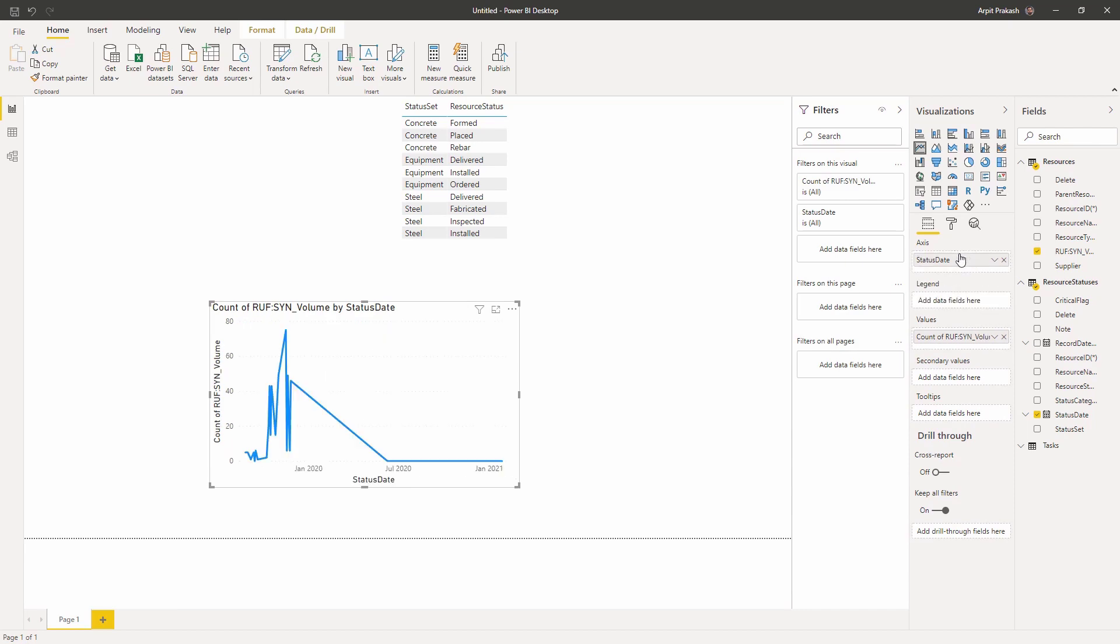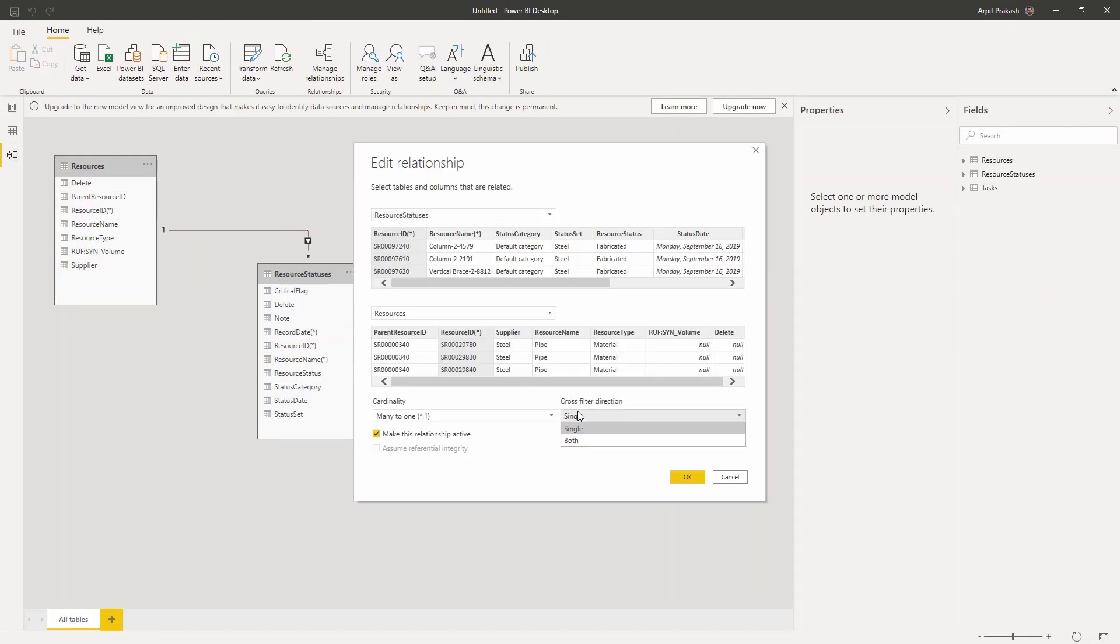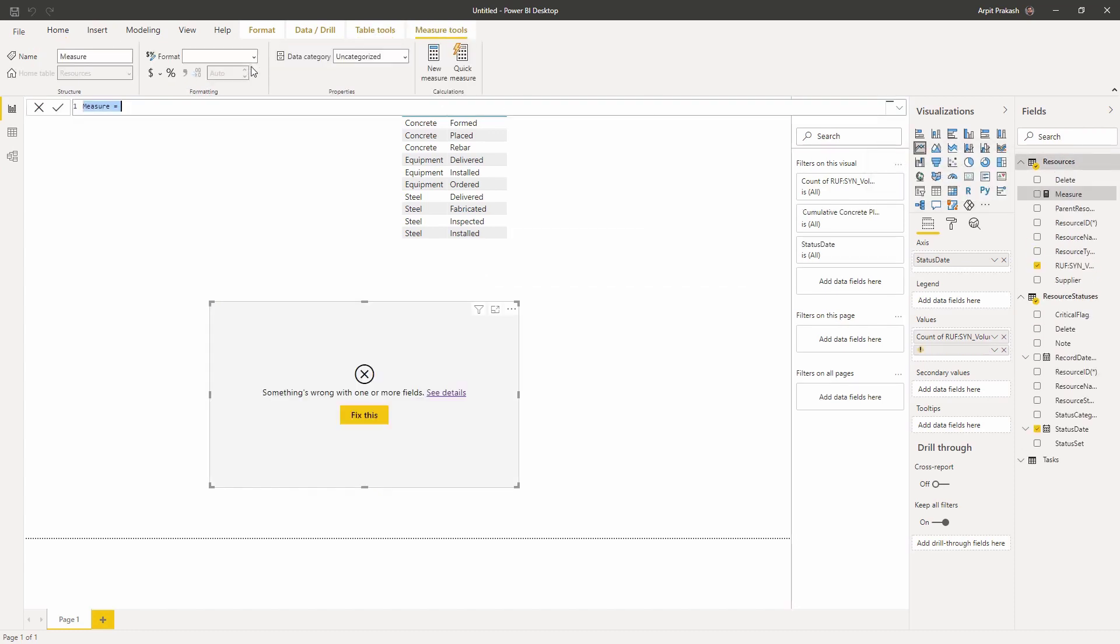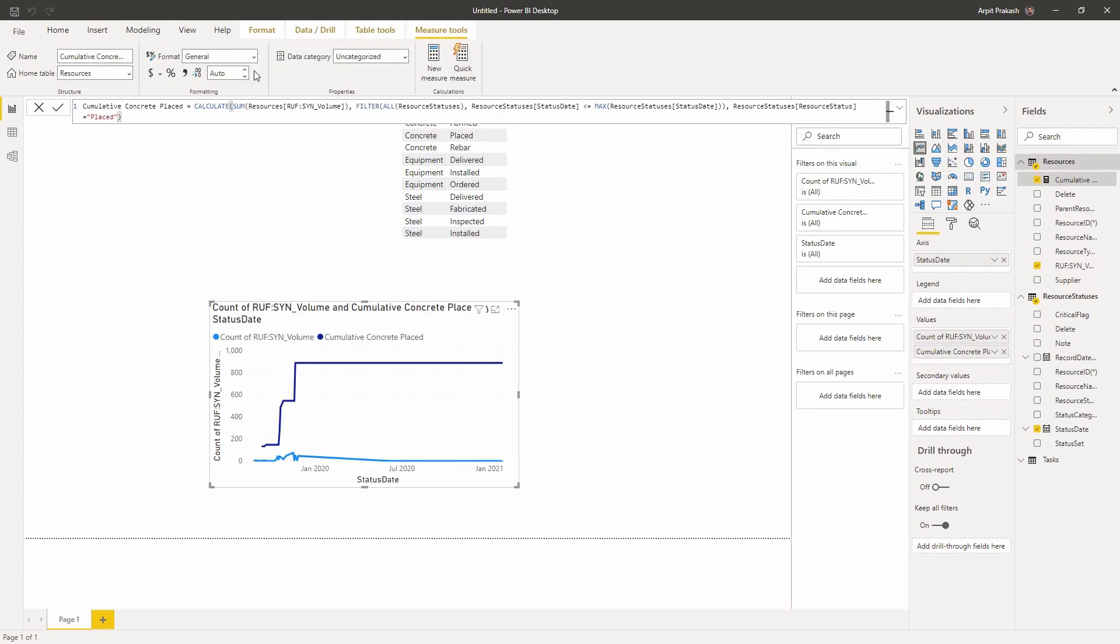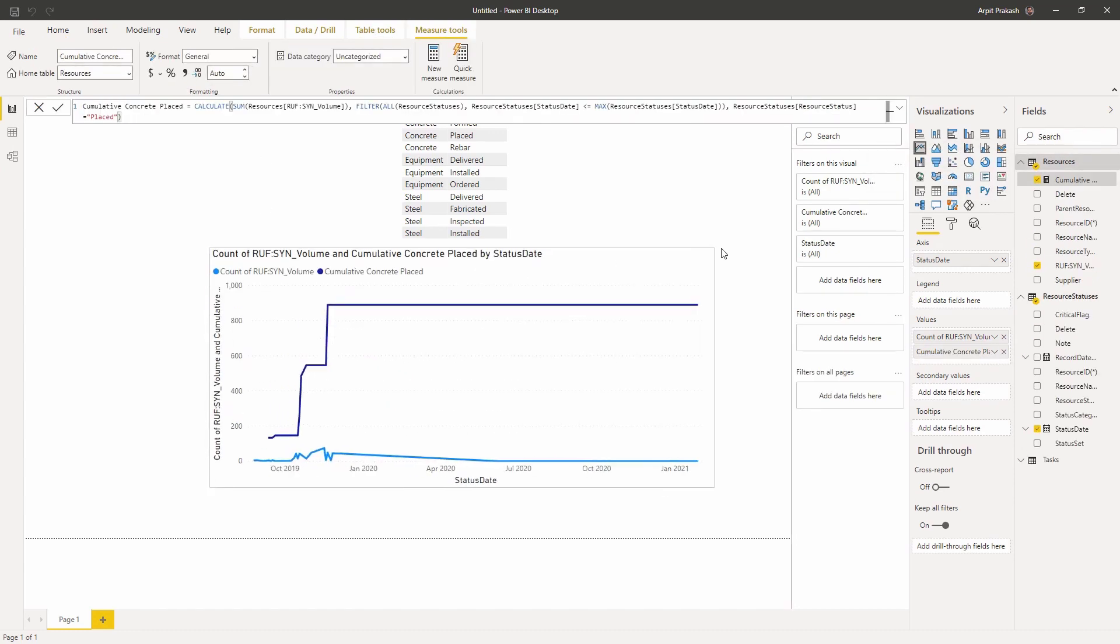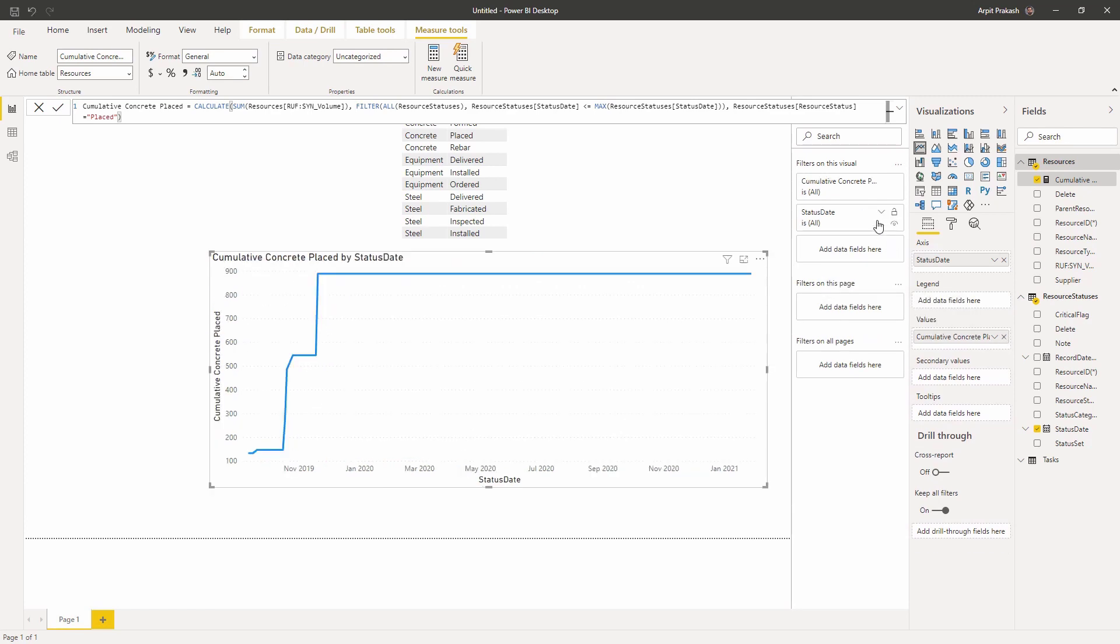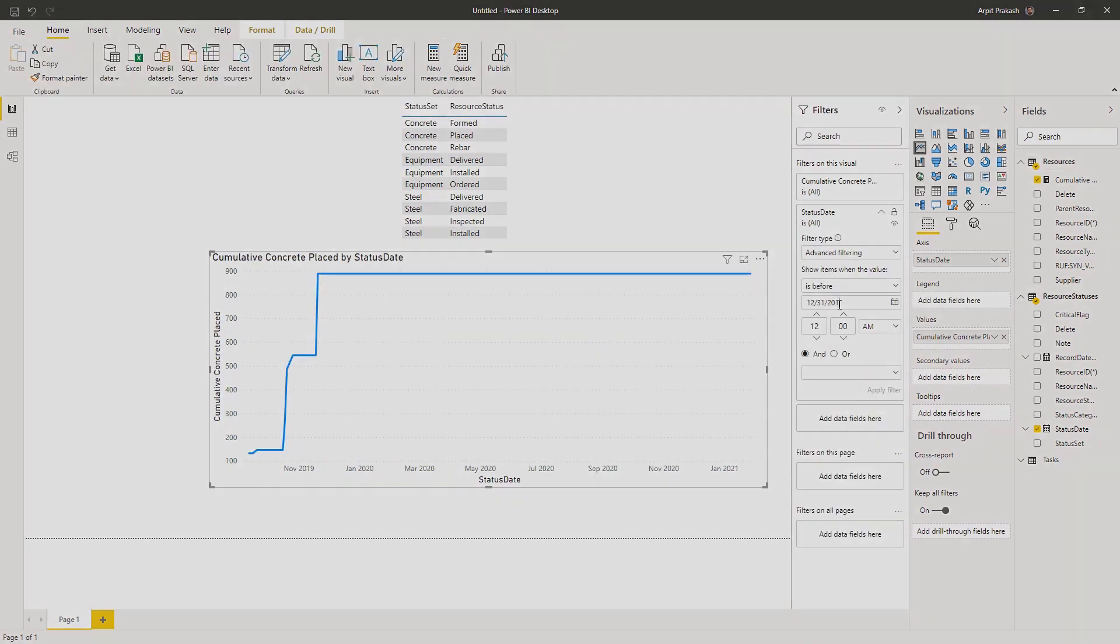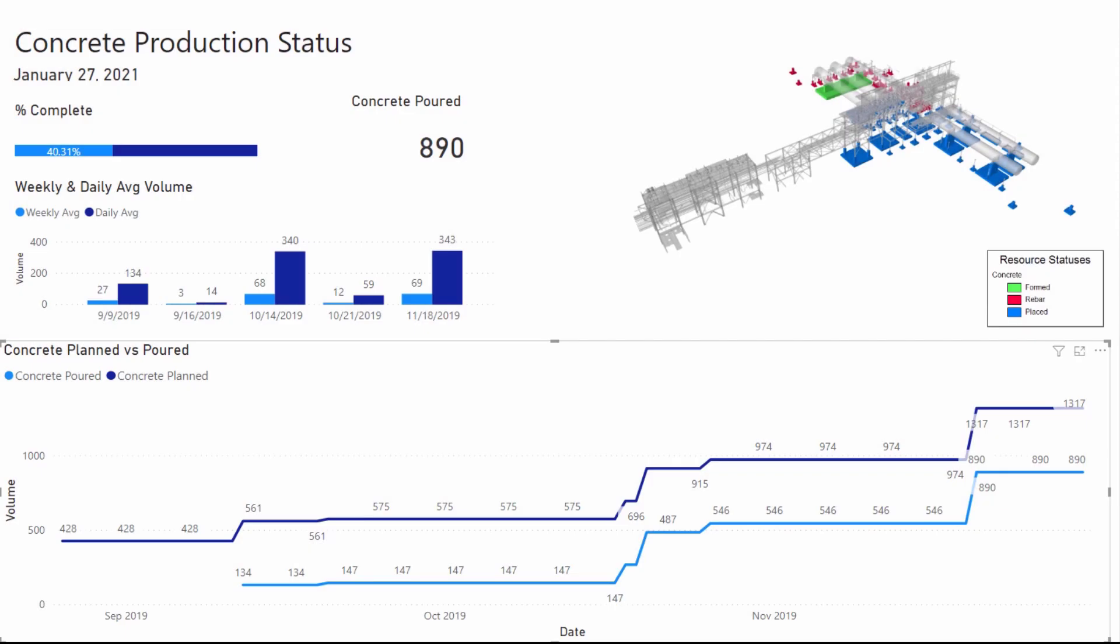Having the relationship between the two tables allows me to create a measure to get the cumulative volume of all the concrete resources having the status as placed. Just using the data I imported in this exercise, I'm able to create some really informative reports like this one.